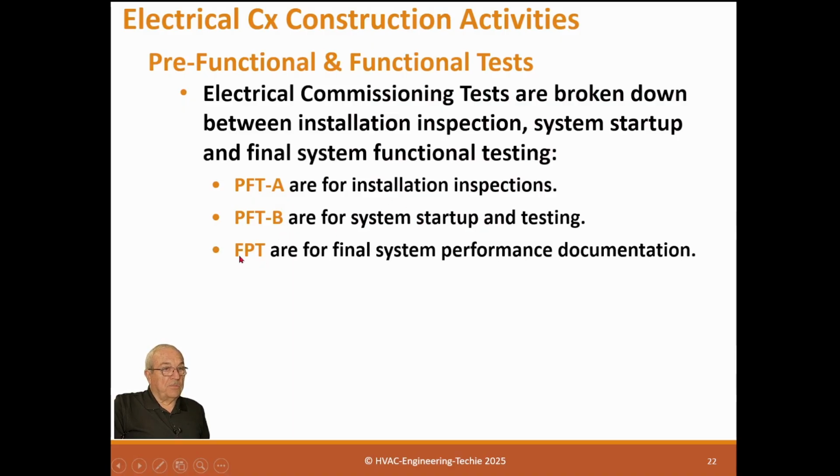And the functional performance tests, FPTs, are the final system performance documentation. The FPTs for mechanical are really difficult. FPTs for electrical are not that difficult, but they have a lot of data that needs to be recorded so that everybody knows what these systems looked like when they were brand new.